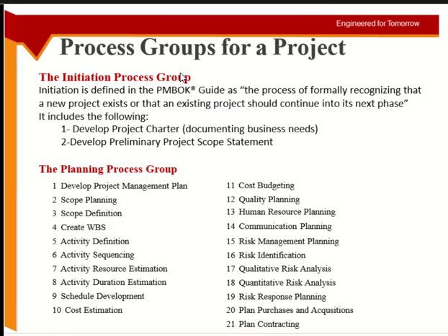Cost budgeting. How are budgeting and estimation different? You estimate the total cost and then budget for each task. Yes, this is one part of it. Cost estimation is knowing the total. Cost budgeting is allocating it: 5% here, 10% here, 1,000 here. What else? He spoke about one part of budgeting, which is allocation, dividing into parts, and the other thing is what?